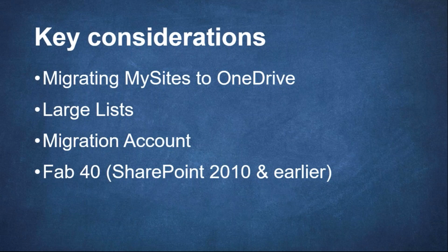Migration account, whatever account you're using for the migration, we use the AvePoint tool quite a bit. And while this might be a unique situation, we had a customer whose password changed, and it wasn't fun. Don't change the migration account password. It's going to result in a bunch of random issues. You don't want to do that. It's not fun at all.